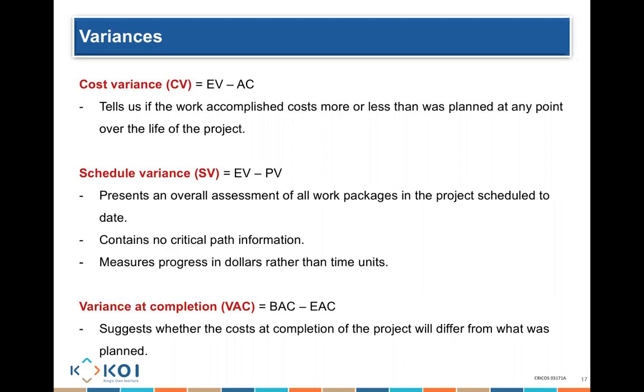It measures really progress in dollars. So we're measuring progress here. Although we're measuring the schedule, we're not measuring time units, we're actually measuring the budget, dollar value. How much were they supposed to spend in terms of dollars at this particular point of time in terms of the schedule? So yes, we are measuring and comparing dollar values, but we are doing that simply to report on whether we are ahead of schedule or behind schedule.